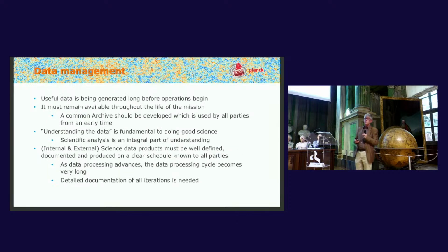And then data management. The thing I want to point out here is that useful data is generated long before operations begin, as I said, all this testing data. That must, in principle, remain available throughout the life of the mission, all the way to the end of the data analysis. So you really need a common archive. I think Euclid really picked up on this lesson learned, and I don't know how good a job they did, but at least they did do that.